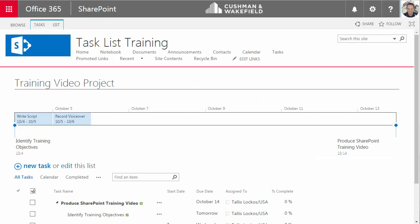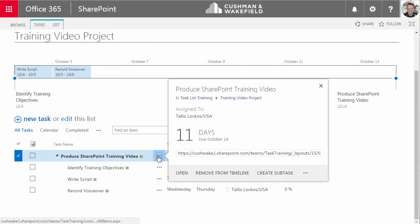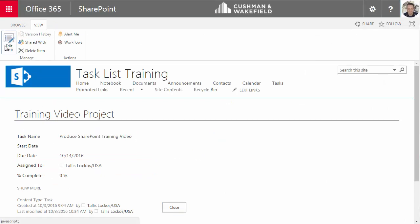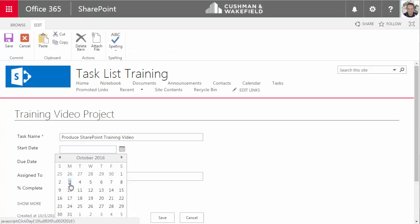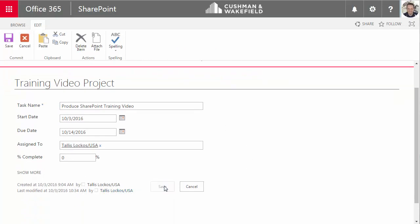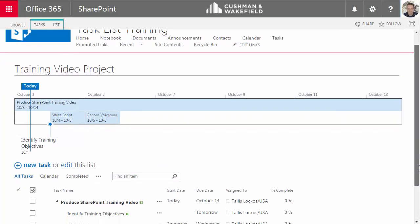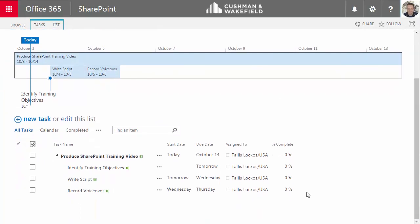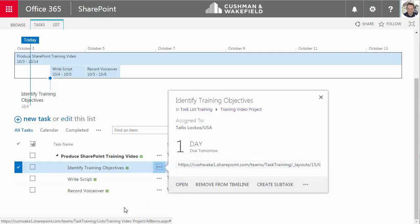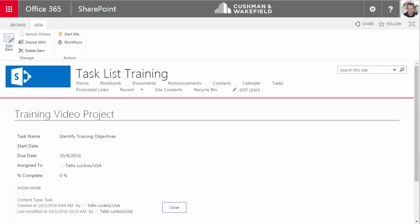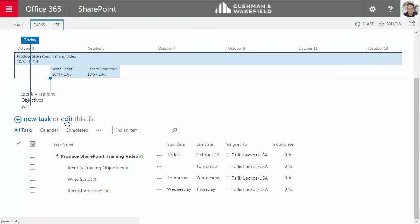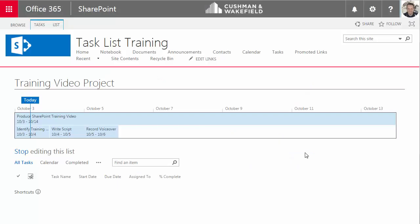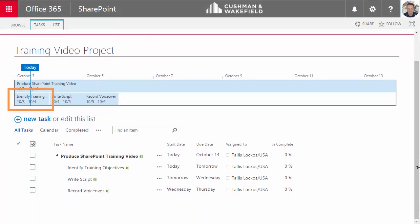Okay, I'm missing some start dates and I want to populate them. I can use the ellipsis to open the item. Then at the ribbon on top, choose Edit Item. And here I can populate my start date for this project, this summary task, and click Save. And you can see at the top in the timeline view, it filled in that bar for the summary task. Now, this identify training objectives needs a start date. I can use the ellipsis to open it. I can actually just click directly on that item to open it. And I can also edit this directly. I'll click on Edit this list. And when I click on Stop Editing, this item is now displaying as a bar populating the date range from start to end.